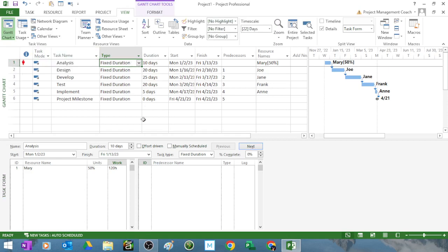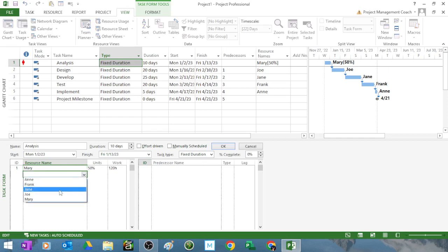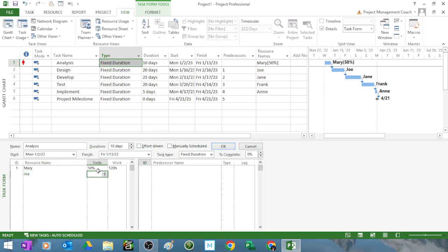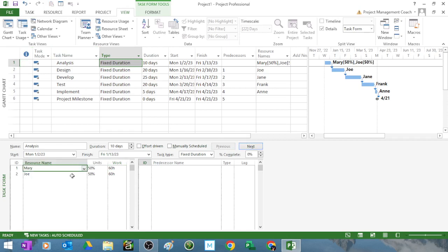So if I'm going to resolve this, I gotta show that I have a resource that is in a greater quantity than 50 units. So if I add another person. Let's say I add Joe. Okay. And I put Joe at a 50 percent. And I take some of this work away. 60 for Mary. 60 for Joe. The duration stays the same. That's okay. The over allocation goes. I got two resources working on that. And it takes away the over allocation.